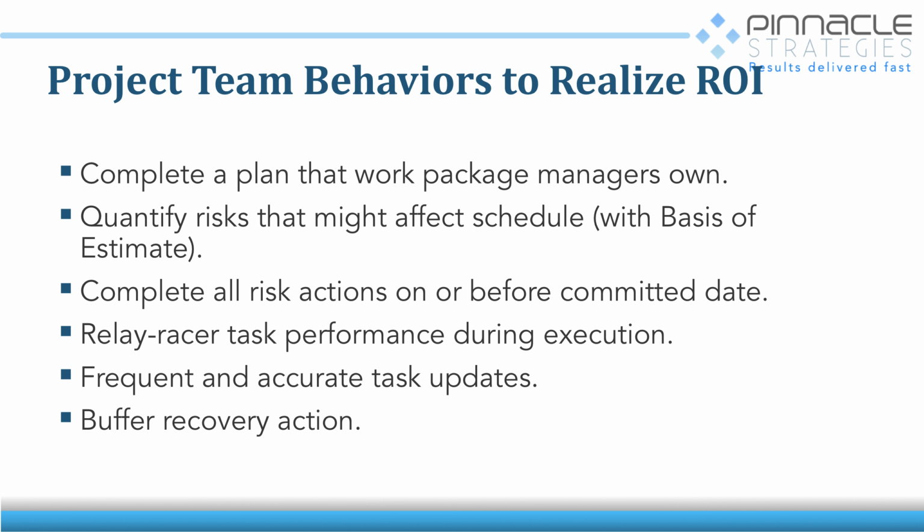And in order to get the ROI, in order to get the cost reduction, what we have to have is a plan that the work package managers own. Own meaning we agree, yes, we can do that. We do the job of quantification of risks. So we spend time to figure out, all right, how big is this risk and what's the chance? We actually complete the risk actions before the committed date. We have a relay racer. So what happens here is we do frequent task updates, buffer recovery action, right? So all of these things are about managing risk.